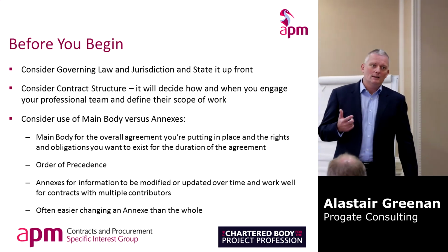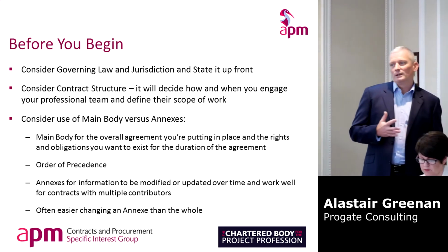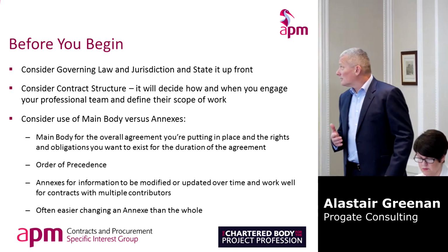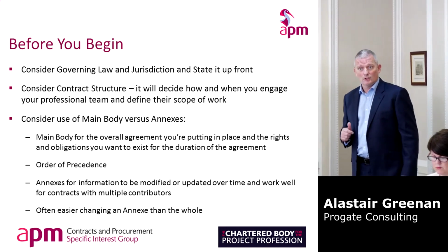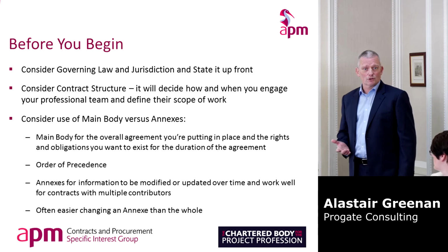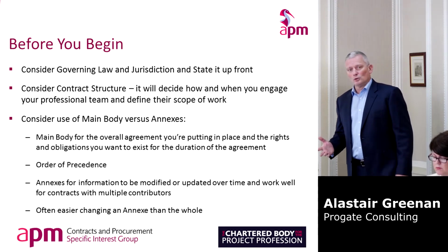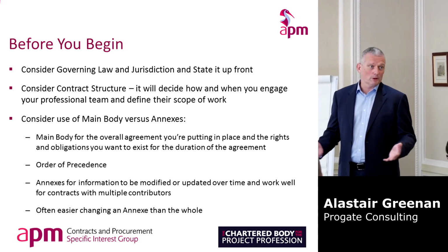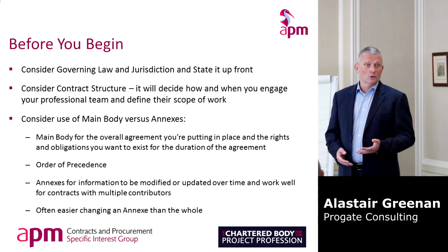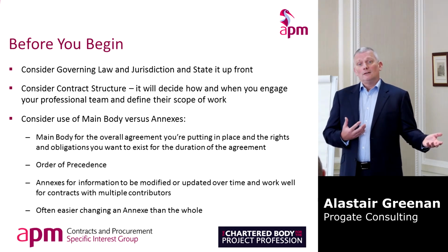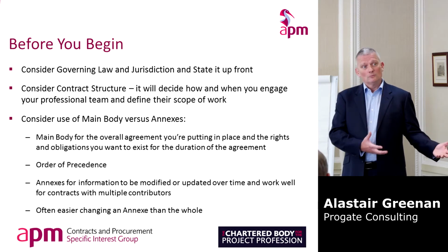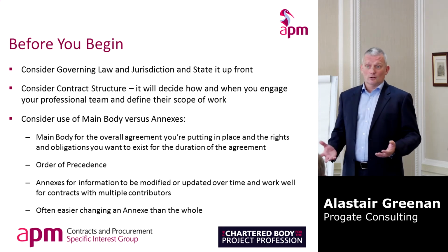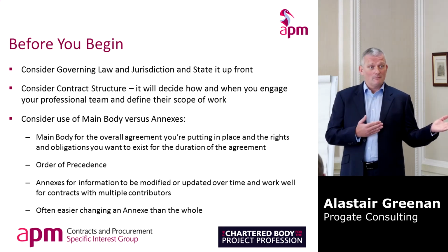Before you begin, one key thing, depending on where you work in the world, I've got it at the moment because I'm working in the Middle East. So whether you work in the UK or not, it's really worth thinking about the governing law and jurisdiction that you're going to work under, particularly if you do international jobs. I'm sure much better qualified people than me will give you the pluses and minuses of different ones, but quite often it's contested in the country of the law. So for example, if you sign up to American law because of who you're working with or custom or whatever, and it all goes horribly wrong, you can probably expect a lot of air miles to contest it.